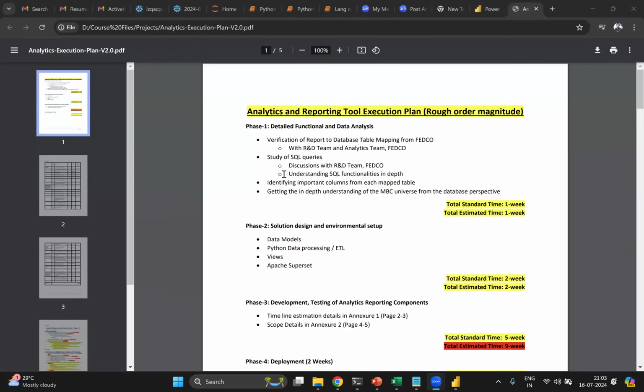If we have anything unknown, for example the client says we have petabytes of data, and even I'm unsure about the architecture, we go back and research which architecture is best. Once we finalize that, we come back, design the architecture, and freeze it. Once everything is good, we make sure we have the resources or not. If we don't, we hire them in parallel.